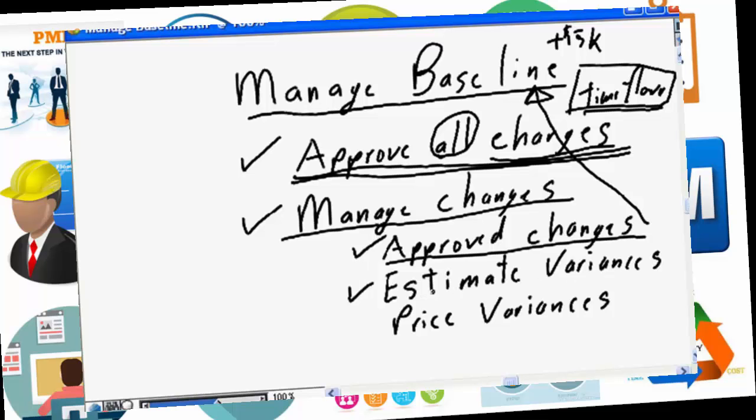That's an estimate variance because you're paying for the resource. The cost variance for that task is going to be double as well. You need to account for and manage estimate variances. Hopefully over the life of your project you will have some plus estimate variances where it's taken more time to deliver your project, and therefore more dollars. Hopefully you will have some minus estimate variances where you were overly pessimistic with the development of your estimate and it took less time, therefore less dollars to deliver the project. There will be some give and take with the pluses and the minuses.